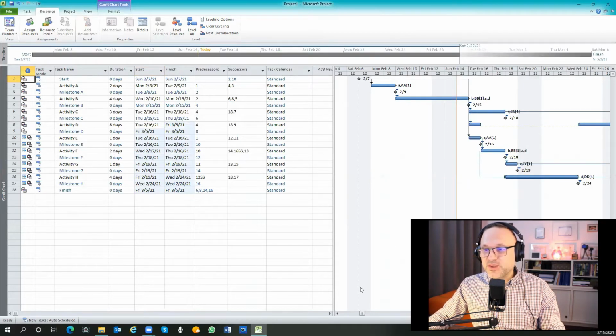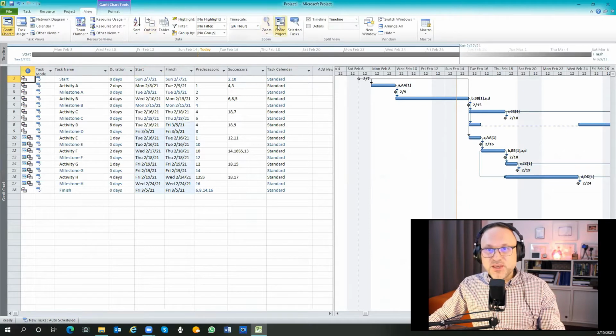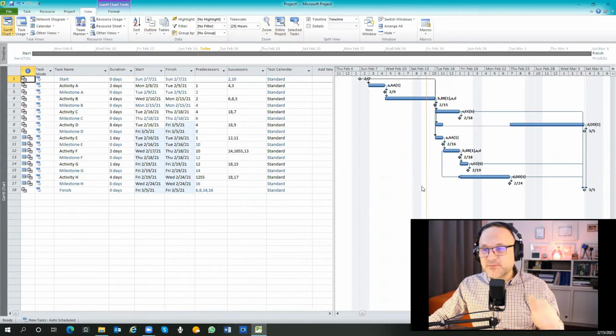And all these activities have been delayed. So I will view the entire project so you can see it. Okay. So you can see that this activity is now interrupted. It started, then interrupted. Those dots are the interruption of this activity. So the activity starts, interruption, and it ends.